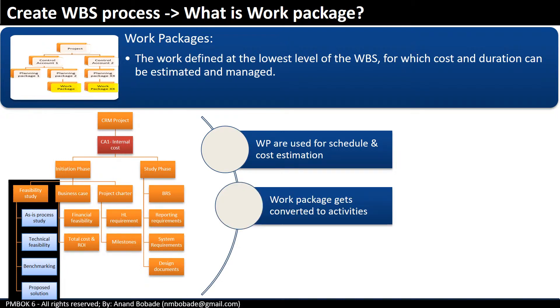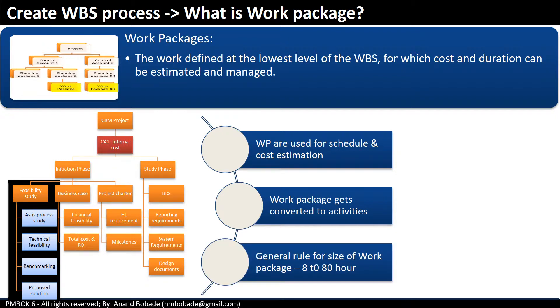These work packages get converted into activities during the estimation process. The general rule for the size of a work package is 8 to 80 hours.